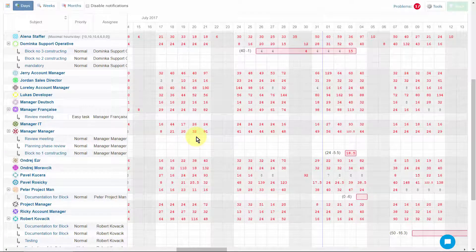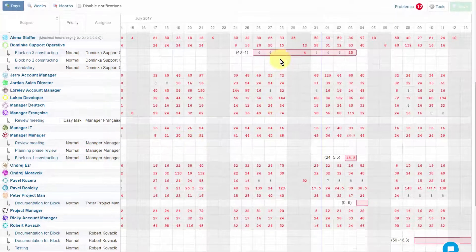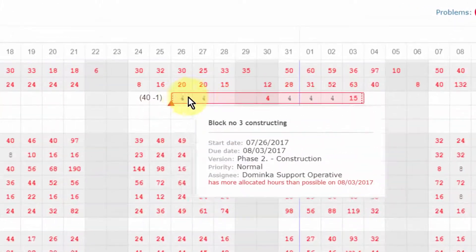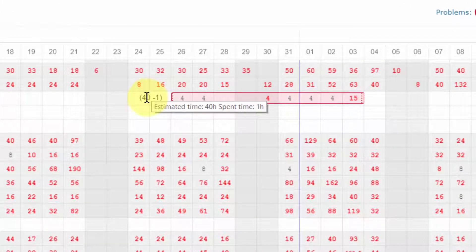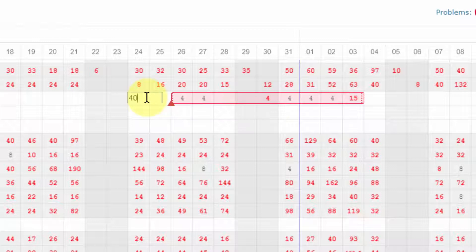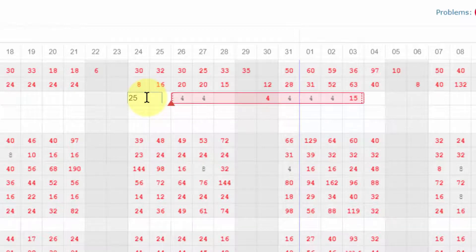Now, let's look at the tasks. To adjust the total number of hours required for a task, simply double-click on this number in the brackets, and write the correct time estimate for the whole task, and confirm by pressing Enter key.